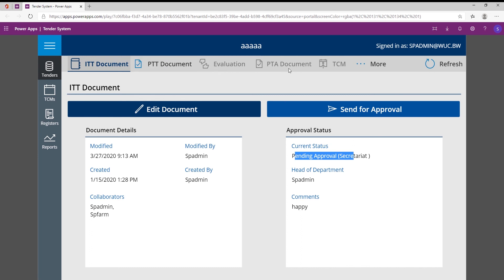And you'll also notice that we're not part of the evaluation step yet or the PTA document, which is Permission to Award document, because we're still sitting with the ITT document. So it just means that people can't skip steps within the business process unless they complete the previous steps within the process.